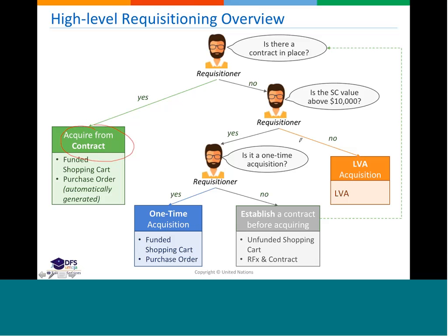The purpose is for you to plan and to work together with the colleague that has the requisitioner role, because these actions, these decisions will impact throughout the life of the project. If we don't capture the costs now, then it will be more difficult to capture later on, and the project may not reach the threshold of the asset. This is why it is important.